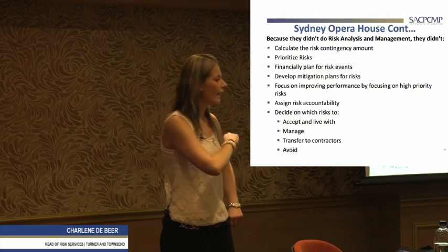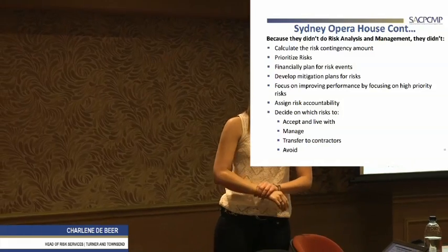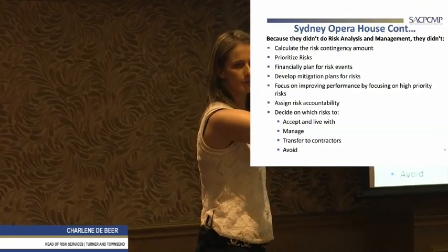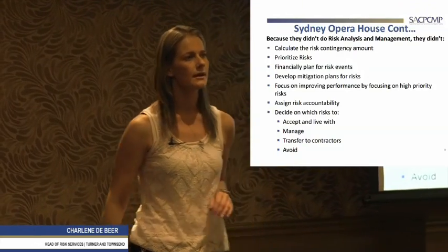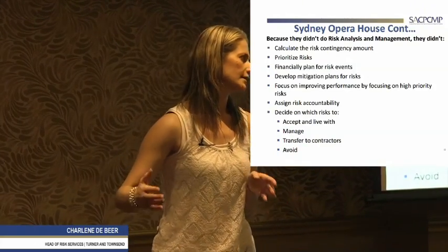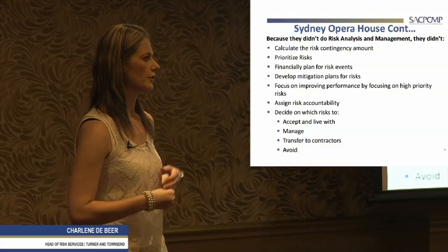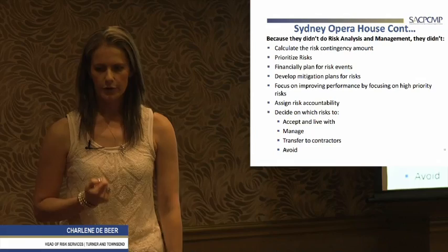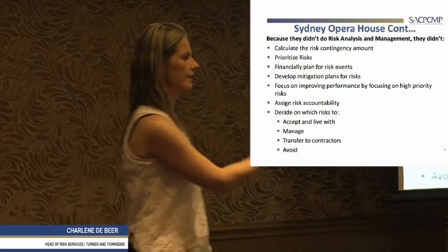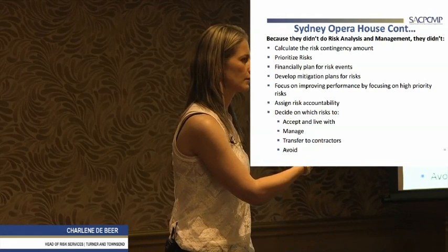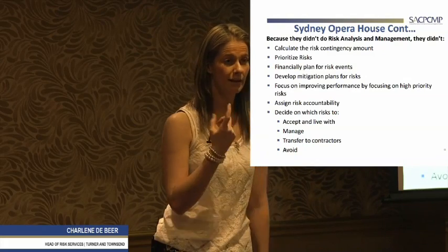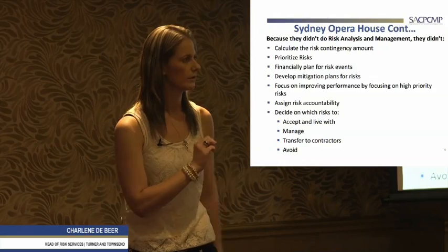Plus, now your valves get on site and you think it's all great, and then another discipline overruns and it poses a threat to schedule. So sometimes to overrun those 4 weeks has a bit more logic in it than just to throw money at it the entire time. So very important from project risk management: if we know what we face, we can know what decision to make. An informed decision. That's a very important word.